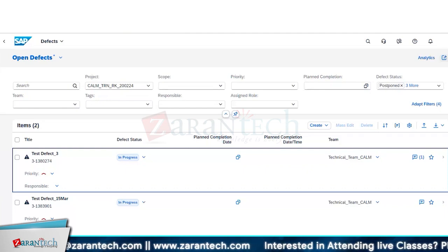It would be there, because it's a good point that you should have some linkage directly, because defects in 99% of cases are going to be worked through a transport. Any change you do will have to move through one, either the existing transport for the same piece of work for the same user story, or you create a new transport for the defect. For tracking purposes, for a defect you do a new transport, so that you know which was the original transport and what was the defect. In some cases they use the same original transport so that all the changes move in one single transport for that particular piece. So you will have to do it manually for the time being.